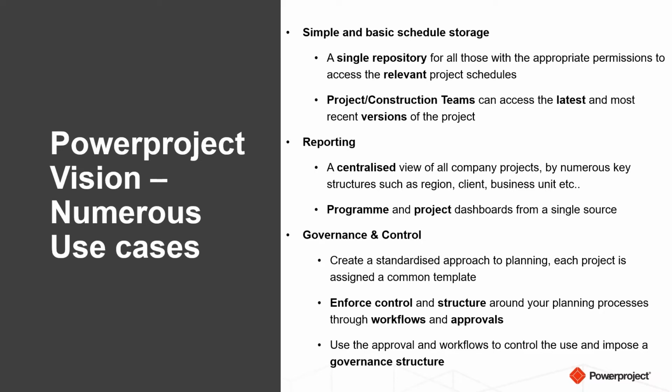So from a reporting perspective, it's a centralized view of all the projects inside there, by numerous structures. So however you structured, coded, costed your projects, all of that data is going into a central database and central information which you can report on. If you standardize the format in your templates, you can then start producing dashboard reports which will show you as we go through. And again, it's the governance and control which is a big part of this as well.